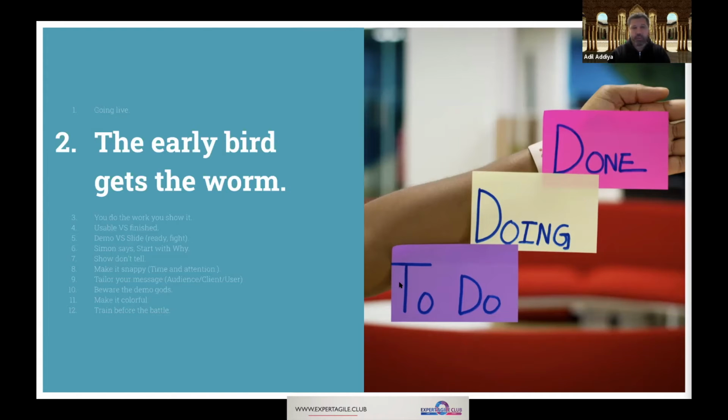This creates some form of redundancy, because by then they have already spent days and days working on other stuff, so there's some context switch, there is some lost information, and they work double time. The good thing is to start preparing for the review at the sprint planning. Once you start identifying the work you want to do, you identify at the same time what you want to show and what you do not want to show, and you have a plan for showing that work at that stage.